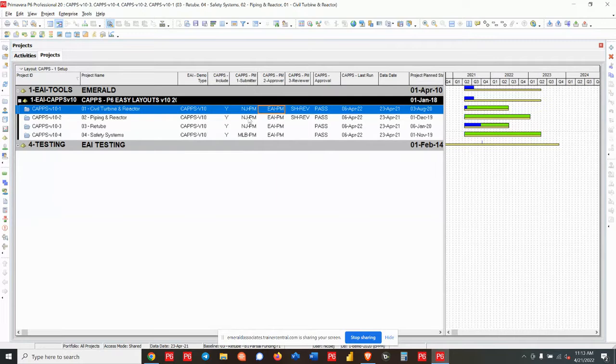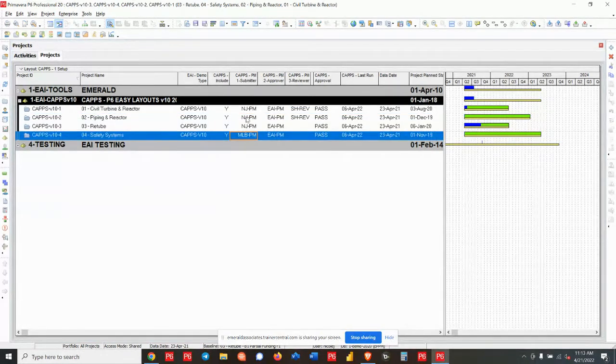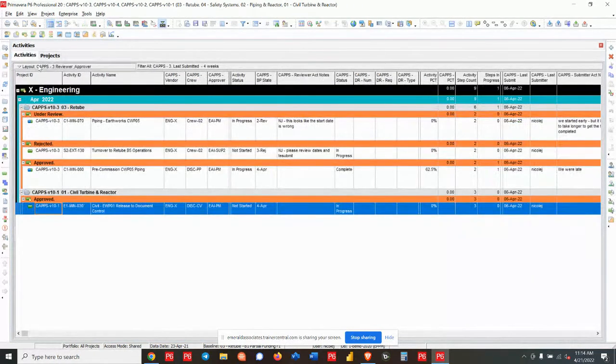Now, you may have one person who's going to do the updates. So you might have, in this case, Nicole Jardin, she's the submitter. But you can see here, Mary Lynn is the submitter on this project. Okay, so you can have one person doing all the updates. If that's the case, you would use a project code to tag who is doing the updates. But that doesn't always meet your needs. In many projects, you might have to go into the activity level.